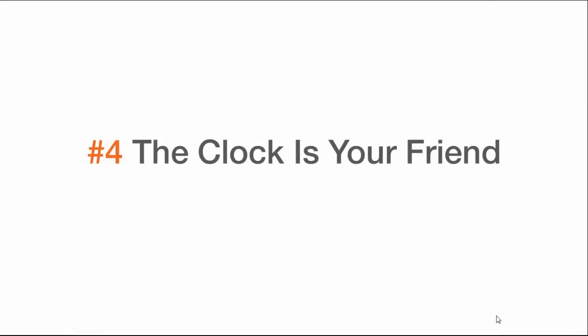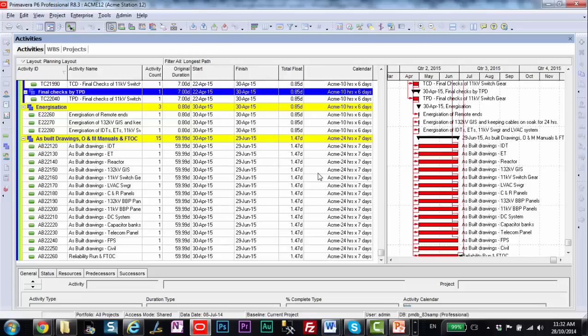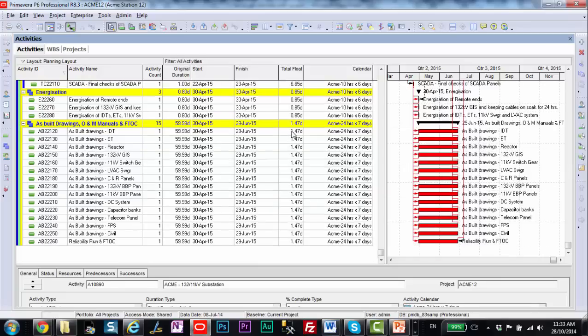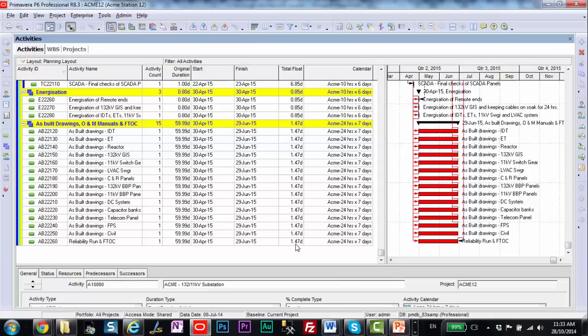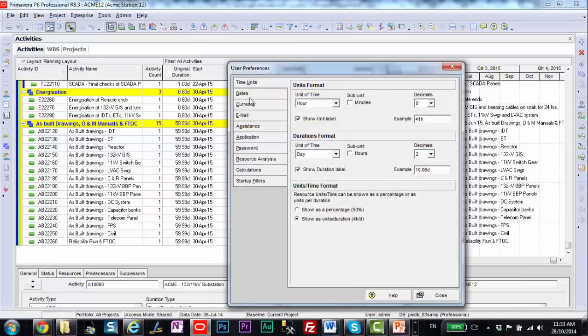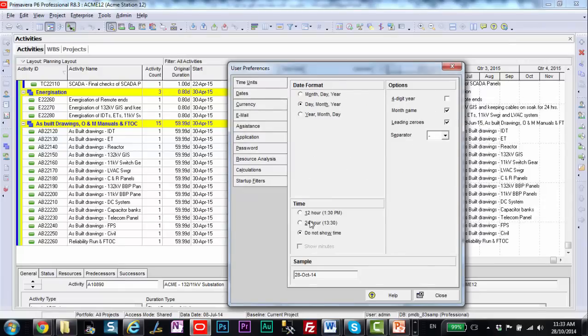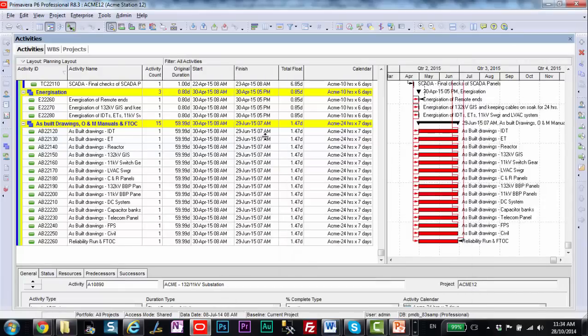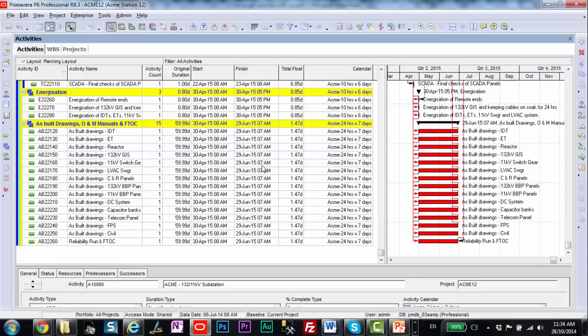Number four, the clock is your friend. Let's have a look. The clock can be a really handy tool for helping you analyze issues with your critical path, issues with dates, and issues with calendars. So here we have a situation where we have either .85 days of total float or 1.47 days of total float. And I'm not really sure what that is and why that's going on and why I have 5.999 days. Let's go up to user preferences. And on the dates tab here, we want to turn on this 12 hour clock. So here we have our clock now and every date now has a time stamp next to it for start or finish days. Now this can be really handy to help me understand what's going on.